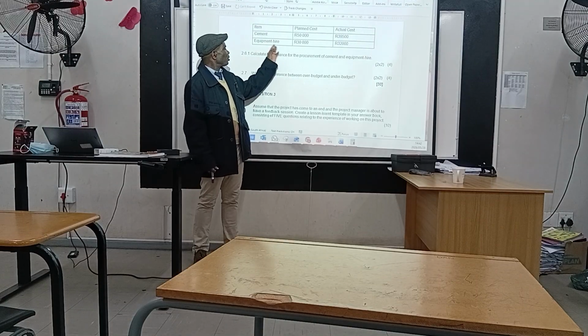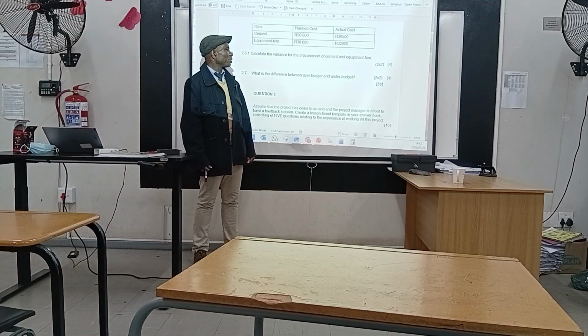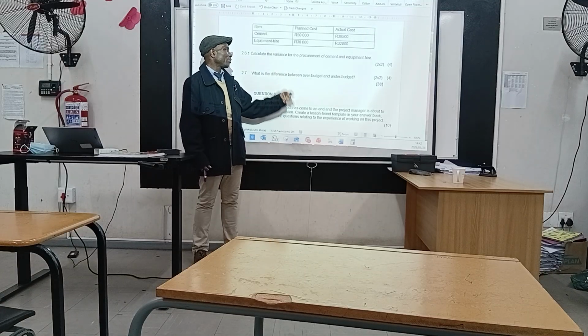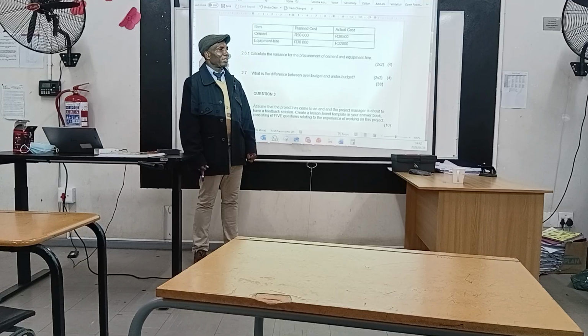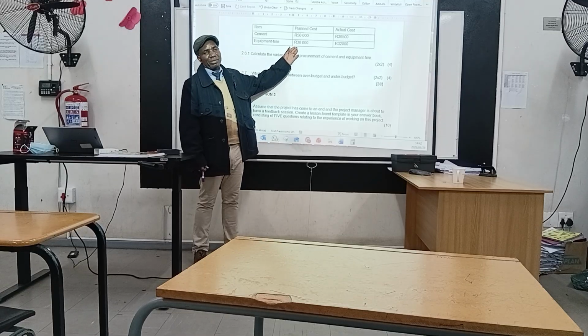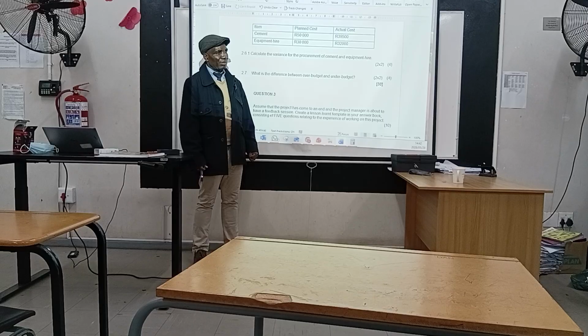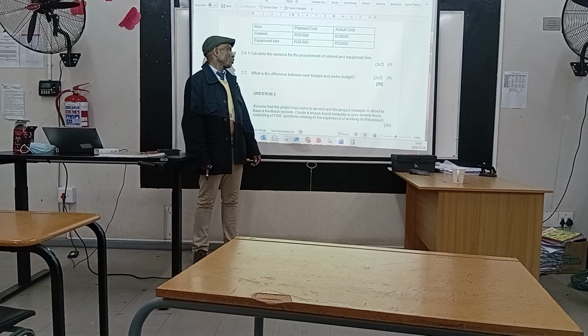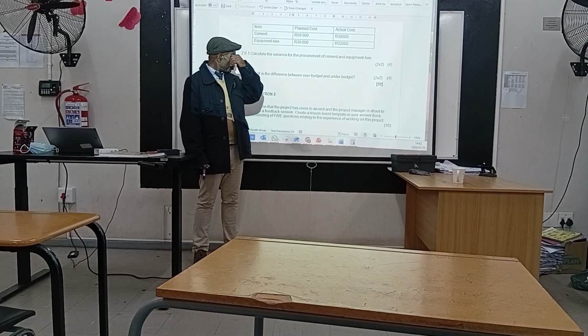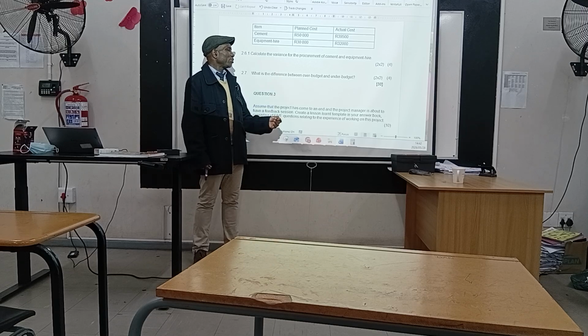For example, now when you look at this equipment, what is happening here? 30,000 was set aside in terms of the planned cost. Now the amount that was eventually spent was 32,000, which is over the budget.